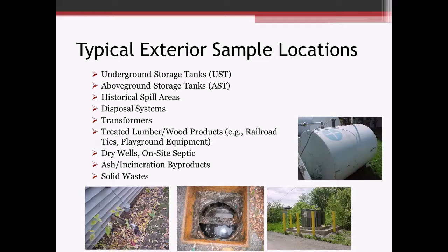And a lot of times if there was a leak or an overfill with those, it's usually addressed at the time of the leak or the overfill, and you don't really have as much of a concern. Or you see the system's failing before it actually fails and you replace it. So those above ground storage things, not a high risk, but good to know if there is anything around the area, especially if they're not in secondary containment or on a concrete pad where they're directly exposed to the ground. You might have some issues there.